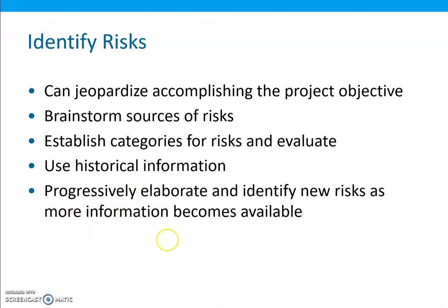Also, it should be noted that at the beginning of the project, it may not be possible to identify all risks. This is especially true for longer term projects, such as multi-year projects or projects that have several phases. It may be easier to identify risks associated with the near-term efforts, but as the project progresses, the project team can progressively elaborate the identification of new risks as well as the estimated impacts of previously identified risks as more information is known or becomes clear. That's the brief